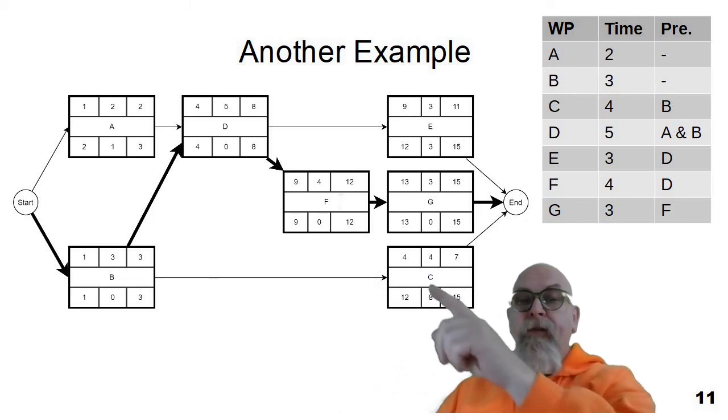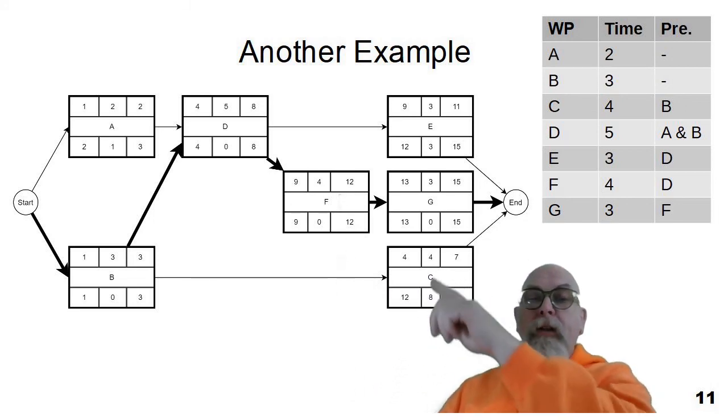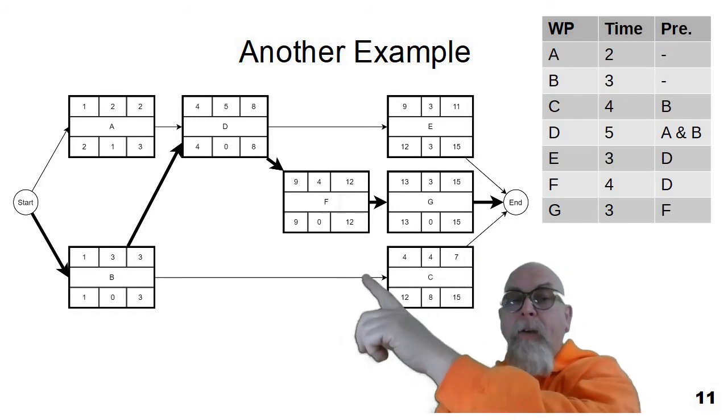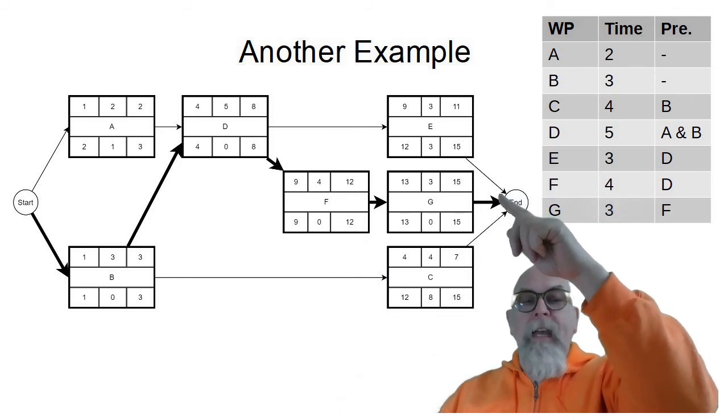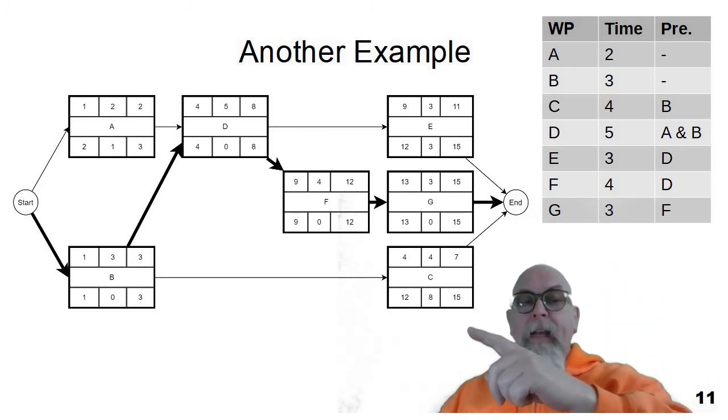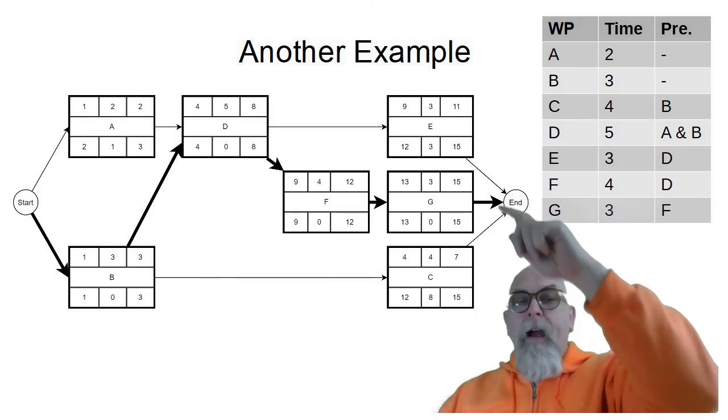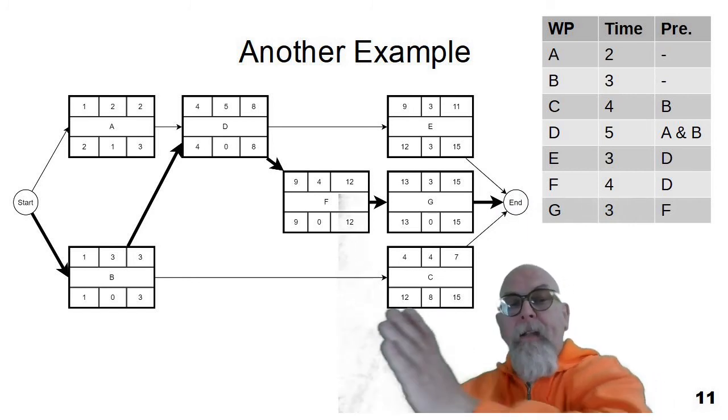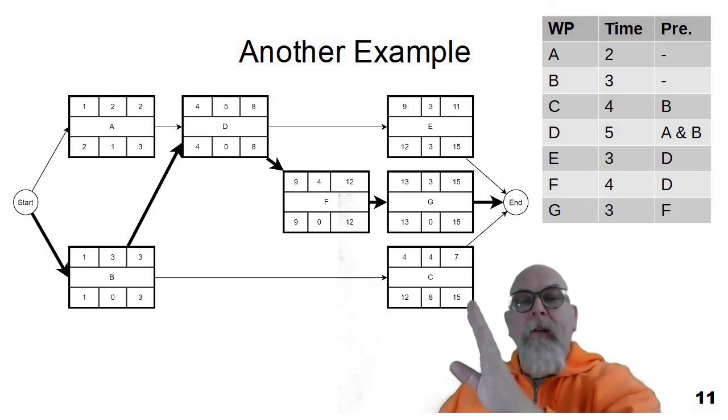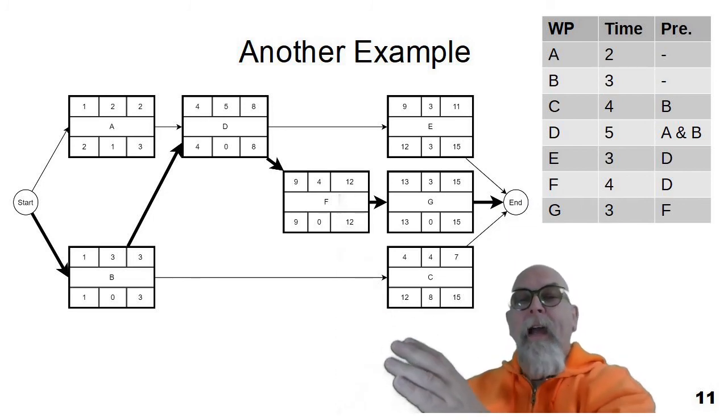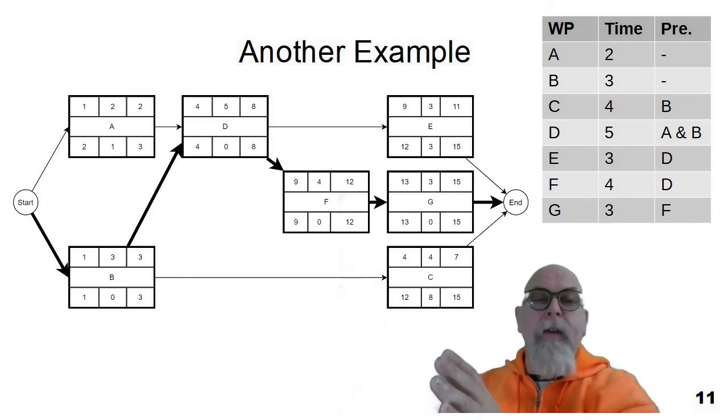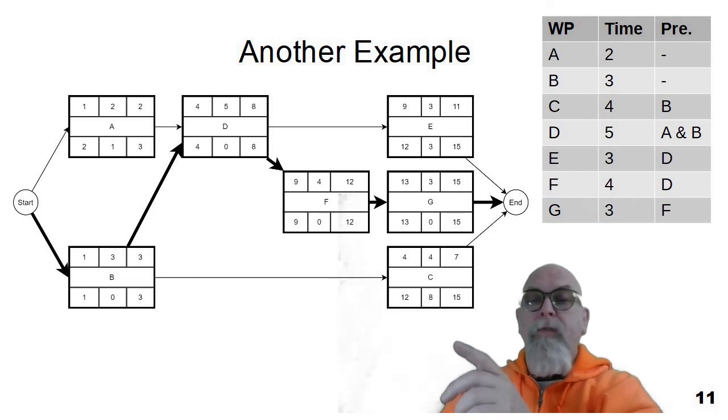We go through and assign ones to A and B because they're the beginning. We then calculated the early finishes through the network diagram, early starts through the network diagram. We then back calculated the late finishes. I then came here and said, well, fifteen is the latest early finish. So I made that the late start here, here, and there. And then I calculated the late finishes, calculated all the late starts, and calculated the slacks. And we can see that the critical path for this network is B, D, F, G.